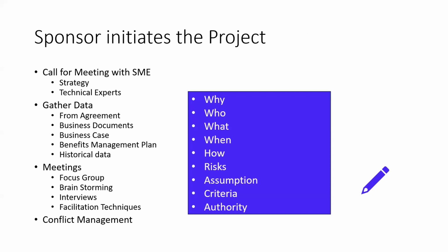Now, the charter is developed by the project sponsor. He or she can collaborate with the project manager to build the project charter, but it's the sole responsibility of the sponsor to build it. So the sponsor calls for meetings with subject matter experts, from strategy, technical experts.